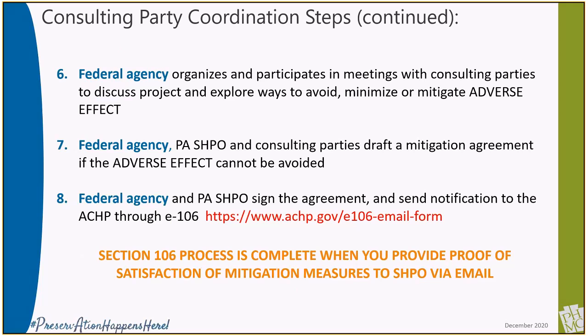Once the consulting parties have been identified for the project, this is step 6, by the way, even if no one elects to participate other than the federal agency, local government, and the SHPO, a meeting or conference call can be scheduled. In these COVID times especially, meetings are usually conducted via conference call or Skype. Once the issues have been explored and discussed to all parties' satisfaction, it is time for the next step.